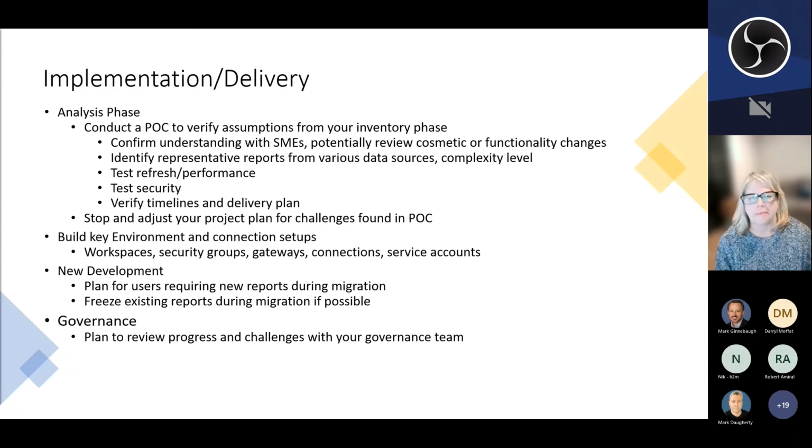Don't have your resources set up and ready to go on day one and then have them wait 5 or 10 days, because that's how long it takes to get access to this one data source, right? Think ahead on those things and start getting those connections built up. Start building out the gateway so that you can test how they're going to perform early versus at the very end and it doesn't work, right?